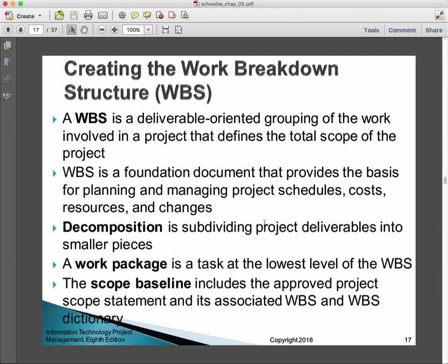You have to remember the deliverables are the parts of the product or service that we are producing in the project, or they are some intermediate work products that facilitate the eventual production of the product or service. Now, why do they want us to organize it according to that? Well, because they don't want us wasting time on things that don't lead to required outcomes.